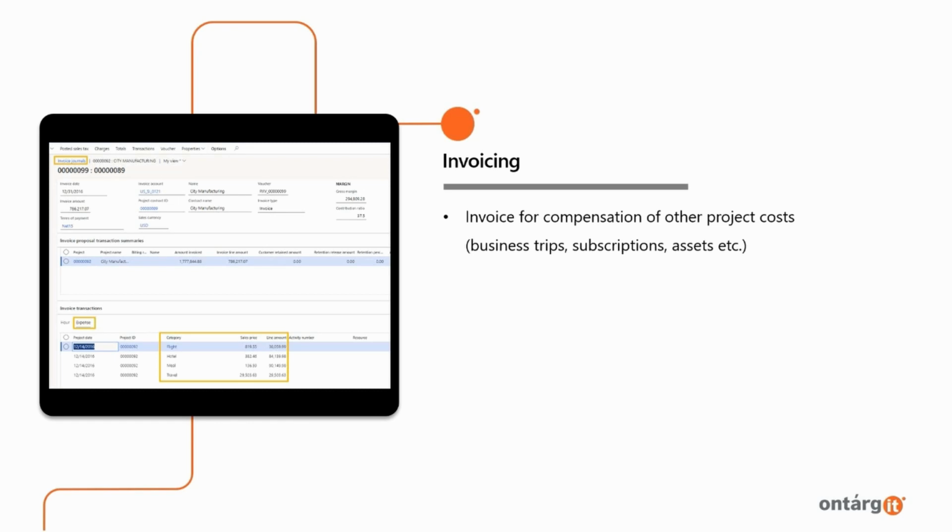The system can also generate prepayment invoices. In this case, when creating an invoice for the completed work, the system will automatically offer to settle prepayment in order to immediately reduce the amount to be paid by the client and include this information in the printout of the invoice. And for a fixed price project, the system creates an invoice according to the milestones that were entered into the system at the start of the project.